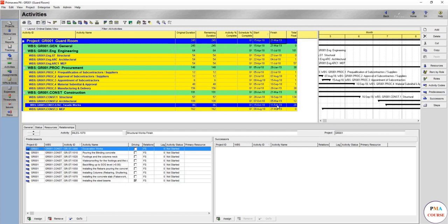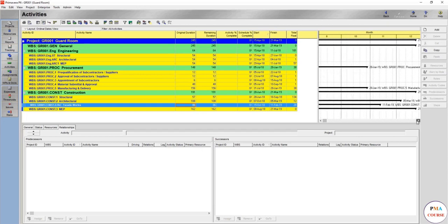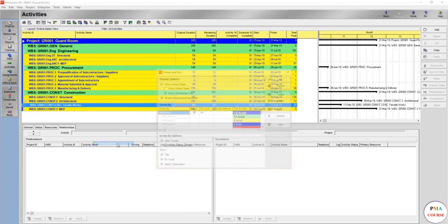Most non-construction professionals, when they see the facade works finished, assume that the building is finished, which is not true, because there might be no finishing inside and no MEP inside. But this is so important, even psychologically, to make the client feel happy that the project is almost finished. It's an amazing tool to monitor your project at a high level, and no activities are shown at all.